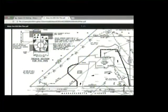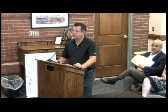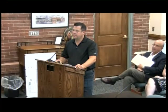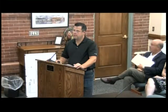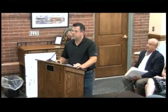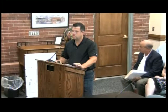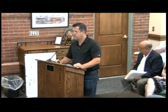Just to add to what Jennifer said, for the record, Jack Sullivan. I'm here with the owner, John Alenio, and Norse Environmental Services did the wetland delineation. This is the one house up towards the old center that's still on septic, and there's a gap in the municipal sewer system, so they have to extend town sewer to their lot line, and then we're going to make the connection. The sewer exits out the back of the house now. There is a leach field. It could be out into the wetland area. We really don't know where it is. There's no records of where it is. The idea was to replumb the basement and exit out the front of the house, and I showed how we access to decommission the existing septic tank in the rear. So it's pretty straightforward. Everyone was surprised it's still on septic, but it is.